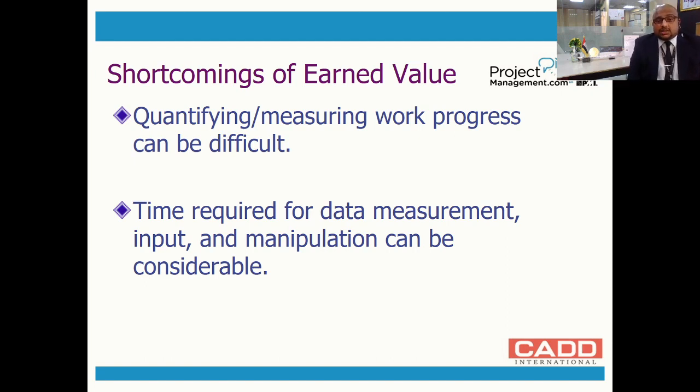Quantifying the work or measuring the work progress can be difficult because, as I said, you are coming up with n number of units. The work progress may be measured in many ways. Some may be according to square meters, some according to man hours, some according to the consumption of US dollars. So the scope is different.